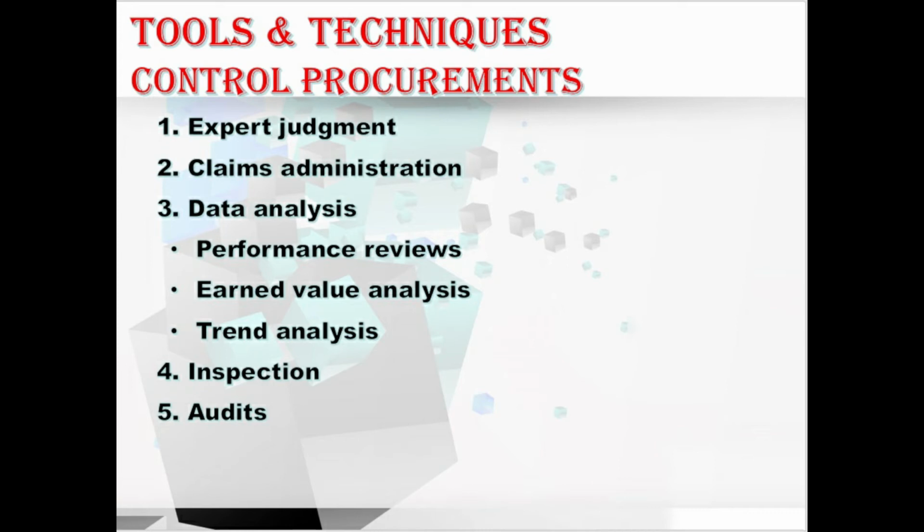The contested changes and the potential constructive changes are those change requests where the buyer and the seller cannot reach an agreement on the compensation for the changes discussed, or cannot agree that a change will or has occurred. These contested changes are called claims. Hope you understood what claims are. When these claims cannot be resolved, they become disputes and final appeals.